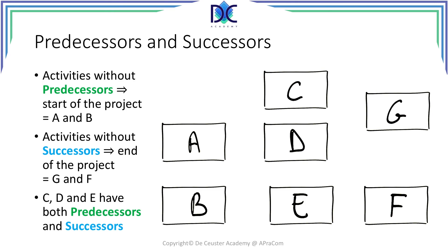Let's look at the relation between A, C, and D. From our example, C and D have a common predecessor which is activity A. E has a predecessor which is B. C and D are predecessors for G, and E is a predecessor for F. The arrows in this graph indicate the relationship between the different activities. We will look at this later in more detail when we are building precedence diagrams and calculating the critical path, project duration, early start, early finish, and other parameters of the project.